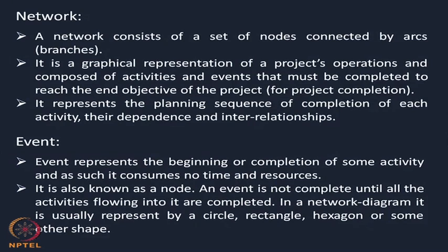An event represents the beginning or completion of some activity, and as such it consumes no time and resources. What is an event? I want to do something, I want to make a soil test. So, this is an event. This event has to start and has to end. For any event, there is no time or cost associated. But for the activity, that is soil testing, this is an activity. For this activity, you require some time and some money.